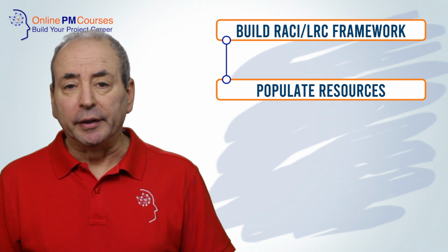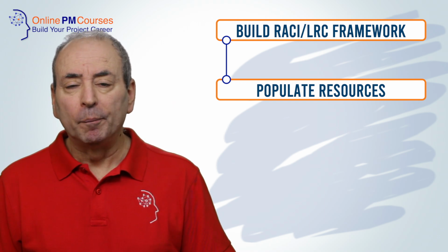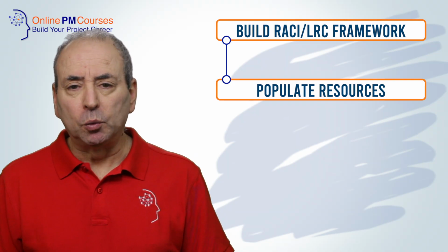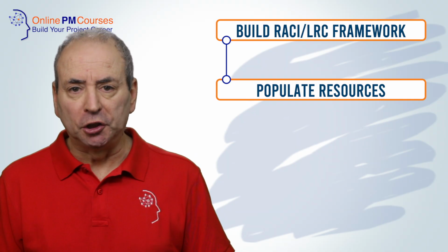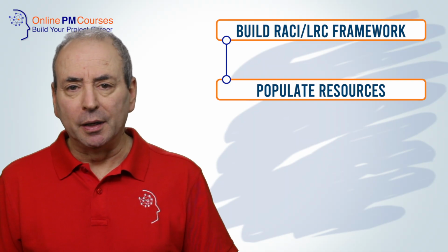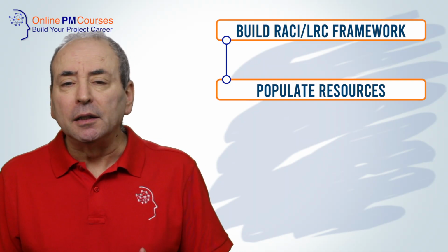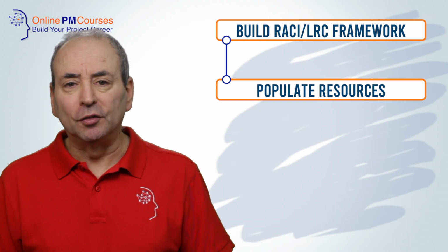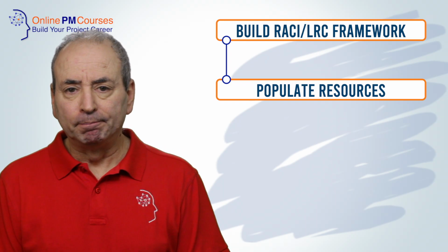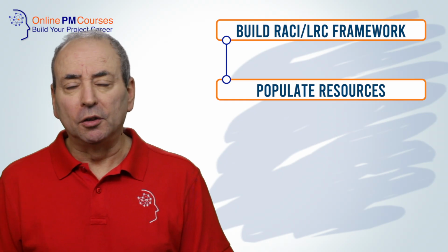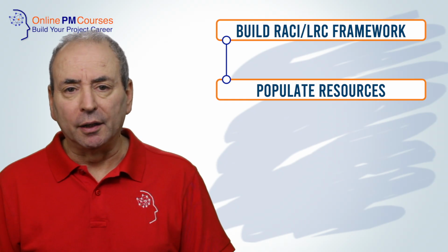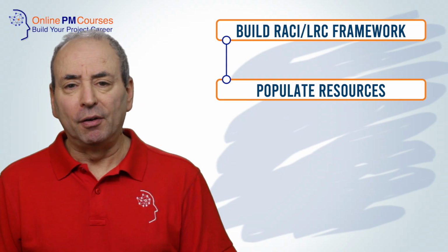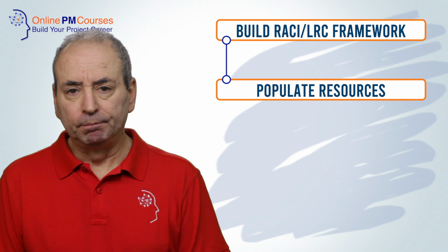Across the horizontal axis, list all of the resources that are going to go into that project. Typically, I start with the human resources, the people, at the left of the chart, and then at the far right, that's where I'll put the materials, the consumables, and then the equipment and the assets. It doesn't matter how you lay it out, but it is a good idea to find a format that works for you and to stick to it. You can also do nice things like color coding or formatting it so that it is easy to read and easy to find what people are interested in.